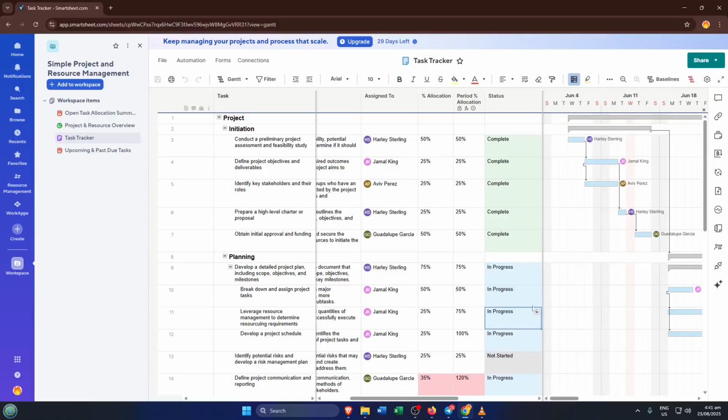Start and end dates along with duration round out your resource management. These dates define when each task should kick off and wrap up. Duration is calculated based on those dates, so Smartsheet helps you stay honest about what's realistic. For resource calculations especially, this matters. If someone's effort is split over 2 weeks rather than one, their true capacity isn't overwhelmed.